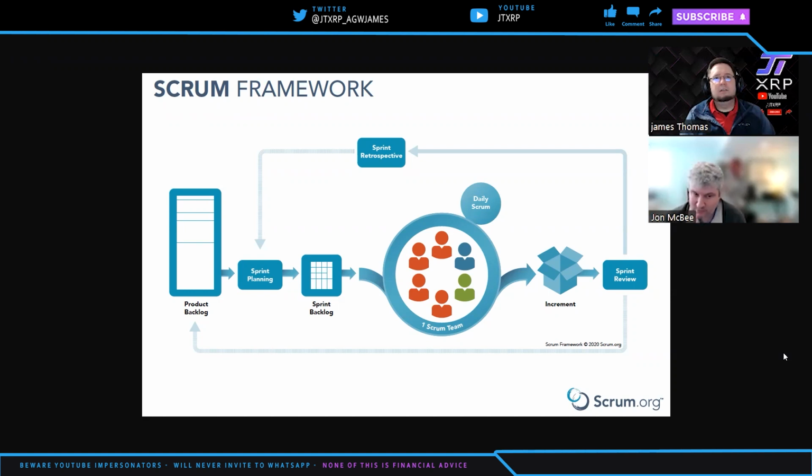We secure funding, and then we'll bring it over and we'll build up the product backlog based on the proposal. And I'll work with the Scrum Master and talk about how we want to sort things. He'll work with the development team. We'll get a backlog for that first sprint, and they go and do it. There are daily stand-up meetings. I don't take part in every one of those. The Scrum Master and the development team are always there. I typically will meet with them once or twice a week. So it tends to be once on Monday or Tuesday, once Thursday or Friday, just where are you now and where did you get to throughout the week.